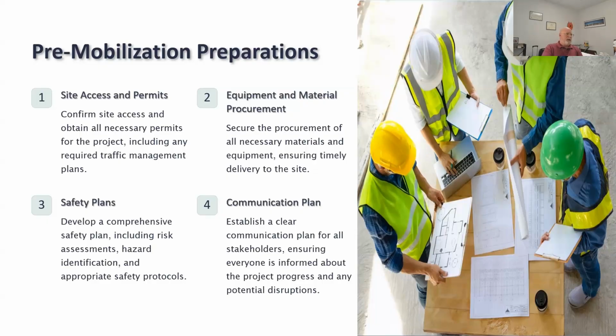And so, again, pre-mobilization, you need to have site access plans. Are we going to be able to set a crane somewhere? Do I have to make some kind of an agreement because we don't have any ability to set a crane here, but our association next door might be willing to let us use a small part of their property to lift, or we can't put a crane anywhere. We're going to have to lift from a helicopter.